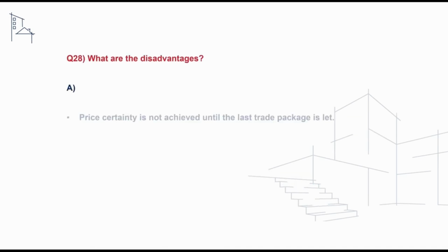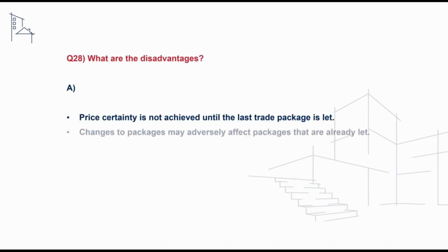Key disadvantages include price certainty is not achieved until the last trade package is let. Changes to packages may adversely affect packages that have been previously let, resulting in complications to the project. The client must be proactive and hands-on in managing their own team of consultants, as well as having an involvement in managing each of the trade packages.